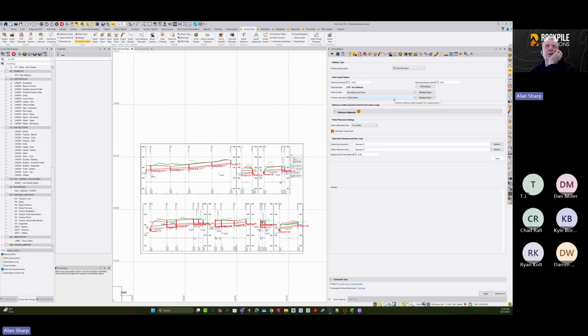So as you featureize an object and say there's a box structure here and it's 24 by 36 or whatever the size happens to be, then it can calculate the structure location from the invert and the rim, and the orientation then has to be set. But once you've set the orientation, then the points associated with that for staking out could be associated with the feature. So you could say I want 25 foot along the long axis, or you may want two points, one at 10 foot and one at 25 foot, or whatever the distances are. You could set those and put those on a layer and have it create those automatically. As you featureize the box, or create the box, you would actually be able to create those stakeout data at the same point.